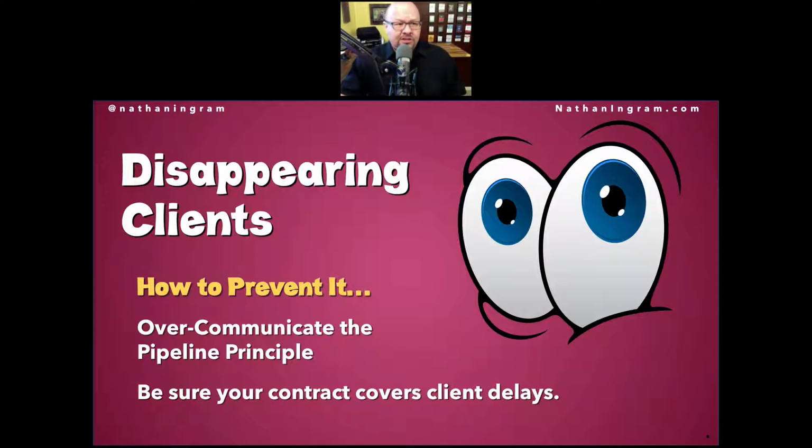Now, one more thing I want to share about disappearing clients, and this is just from long, painful experience by yours truly. The longer a project is delayed, the more likely it is to go off the rails. Because the longer a project is not in focus for your client, the client is going to tend to forget the details. The chances for miscommunications and misunderstandings are going to go up. The longer a project delays, the more likely it is to go off the rails.